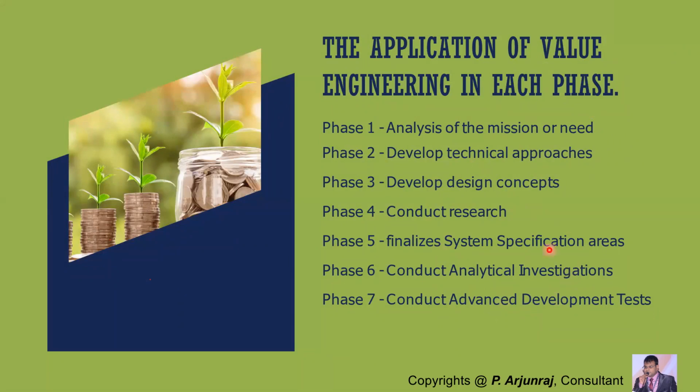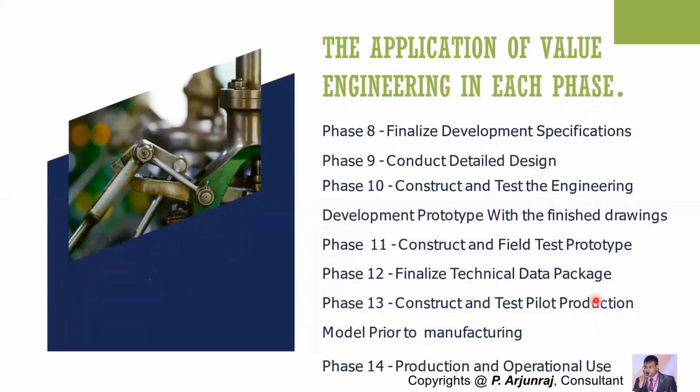So first, you're going to get the data. Conduct research is nothing but the information phase. Then you go for the function phase where you're going to understand the function. Then you go for a creativity phase, and the evaluation phase where you're going to investigate the better ideas. Then you go for a development phase. And in the development phase, you do the design and you also do the construction, you do the testing. That's what I told you, the prototype.